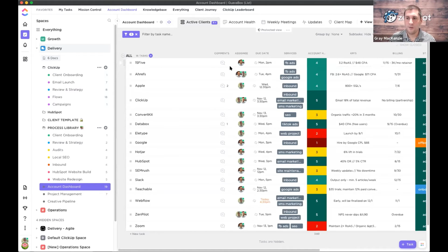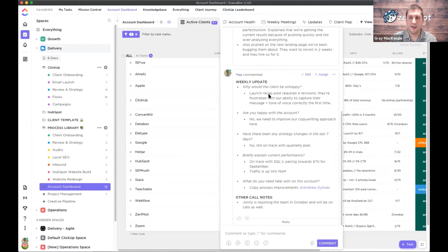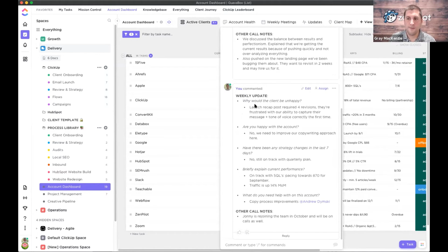What's cool is we use the comments feature, and we have a standard check-in that they're going to answer every single week. So we ask a series of 5 simple questions. Why would the client be unhappy? We're trying to dig for what's causing pain. Are you happy with the account? Andrew, yourself, how do you feel about the account, independent of how the client feels? Have there been any strategy changes? Briefly explain current performance. What do you need help with? And offer the opportunity to give any other notes.